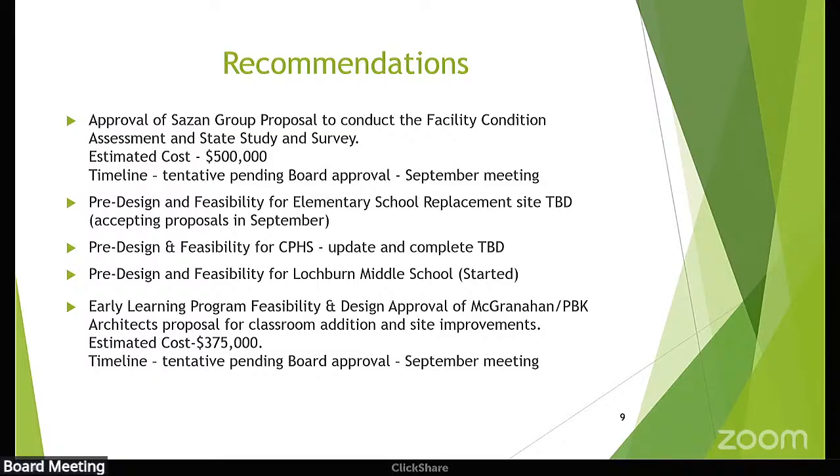So once you get into a project that's so large, you're going to trigger ADA requirements. You're going to trigger the energy code requirements. And that's what makes these buildings not feasible to actually put a lot of money into. You have single pane glass windows in some of these schools. They don't meet any energy codes today. So to even get building permits for them is almost impossible.